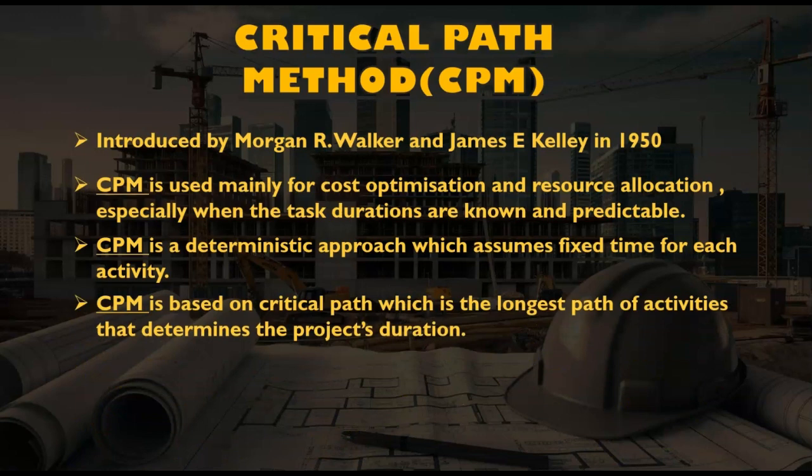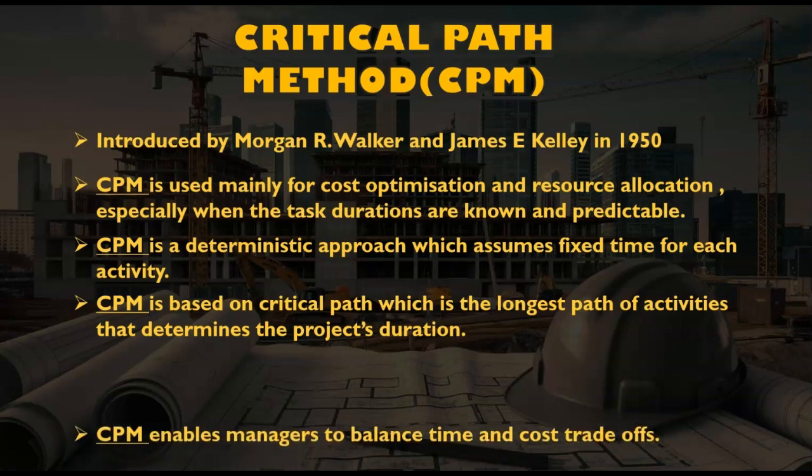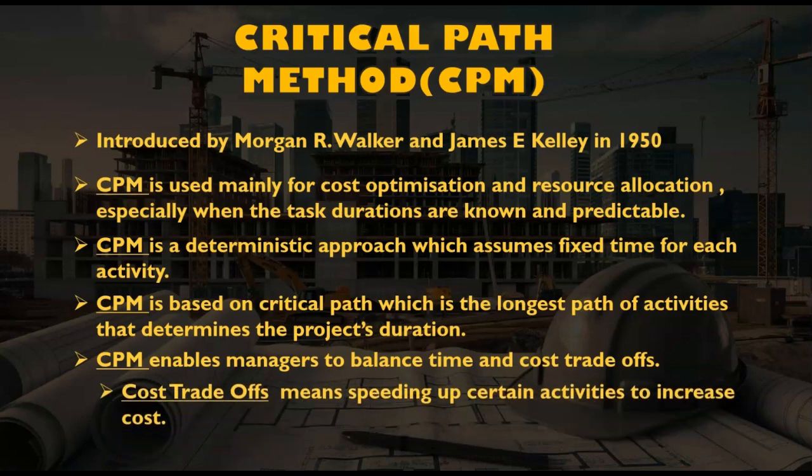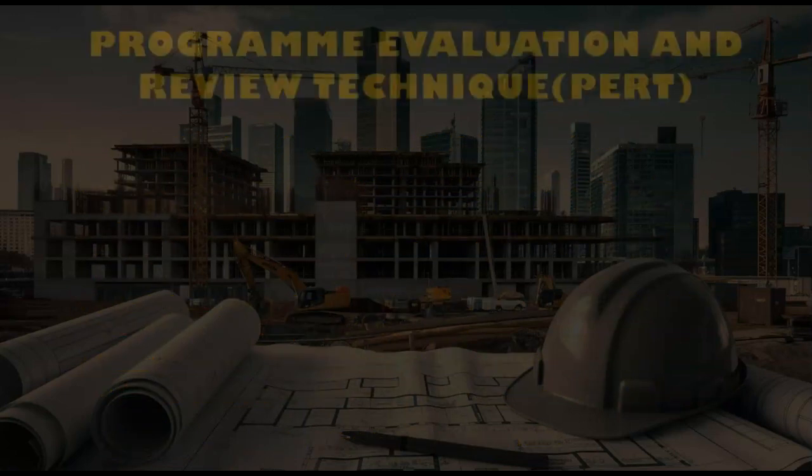CPM is based on the critical path, which is the longest path of activities that determines the project's duration. CPM enables managers to balance the time and cost trade-off. Cost trade-off means speeding up certain activities to increase the cost or delaying certain activities to decrease the cost.